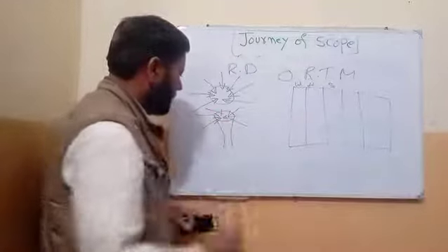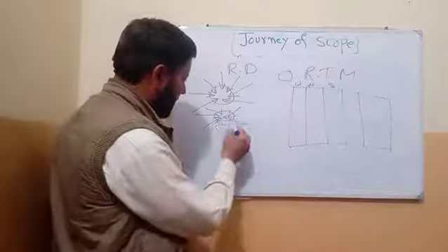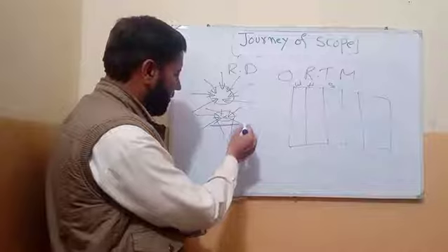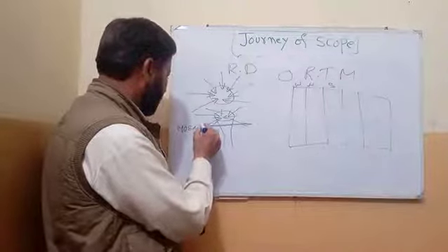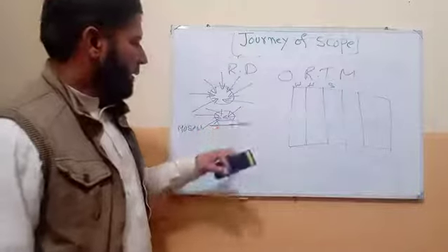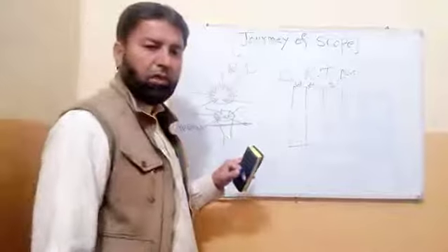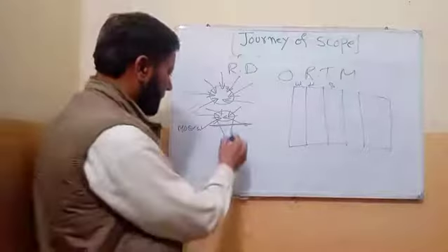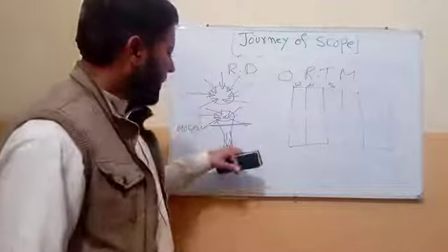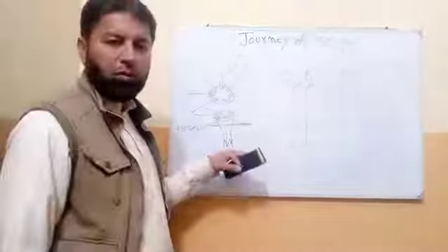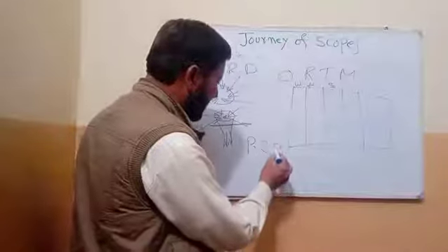Then we filter out these requirements, and we will use a filter layer, which I will call MoSCoW. And then we will use the MoSCoW must have, should have, could have, would like to have, to get the requirements separated into product requirements and project requirements, and we will put these requirements into a document we call the project scope statement.